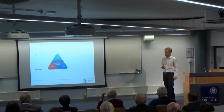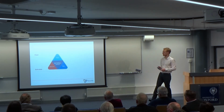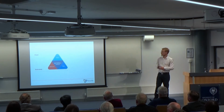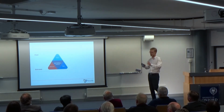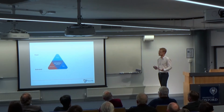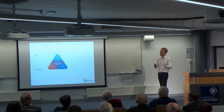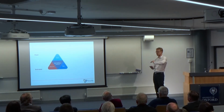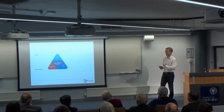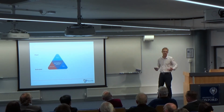Now, in traditional project management for software, on page 1 of any project management manual, you find this triangle, where it defines the 3 elements of any project, right? So scope, what you have to do, resources, and time. And the idea is that you can't fix all 3. If you change one, the other 2 change as well. Traditionally, people come and ask you for something, so the scope is fixed. They want this and nothing else. Not less, not more, just exactly that. And they tend, therefore, to have really large and very long requirements documents, because they need to detail every single thing to make sure they get exactly what they want. And then the supplier has to estimate resources and time to be able to deliver that thing, right?